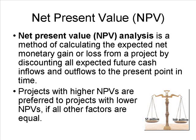First of all, what is net present value? Well, this is a type of analysis — a method for calculating the expected net monetary gain or loss for a project by discounting all expected future cash inflows and outflows to the present point in time. In other words, what is money in the future going to be worth today? Projects with higher NPVs are preferred to projects with lower NPVs if all other factors are equal, and in this way we can use this to help us select a project.